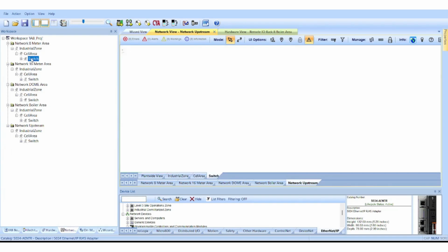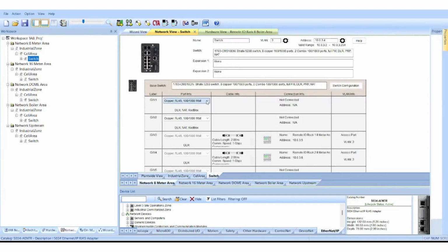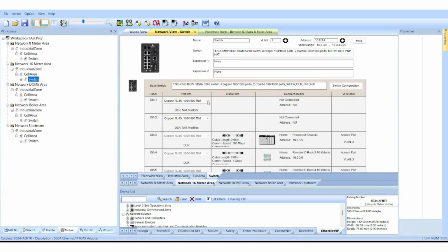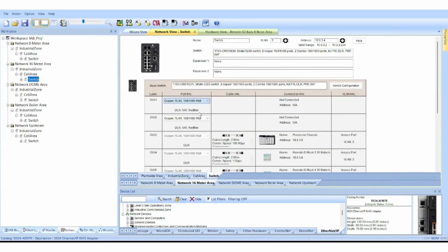But remember, software is an engineering tool. It does not replace engineering judgment. Before releasing the final BOM, the engineer should still verify the part numbers, quantities, compatibility, spare capacity, communication requirements, and project-specific requirements. The final responsibility remains with the engineer.